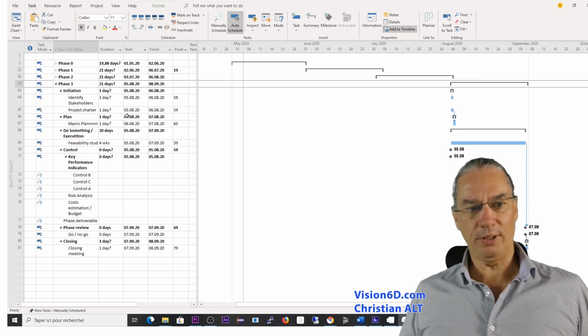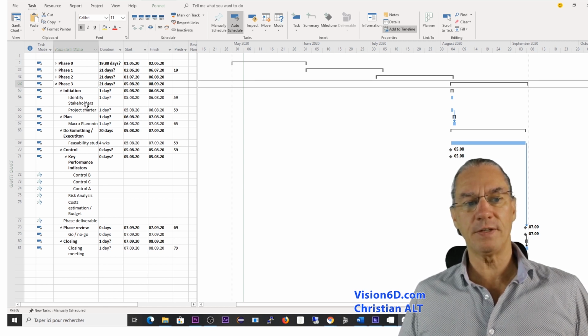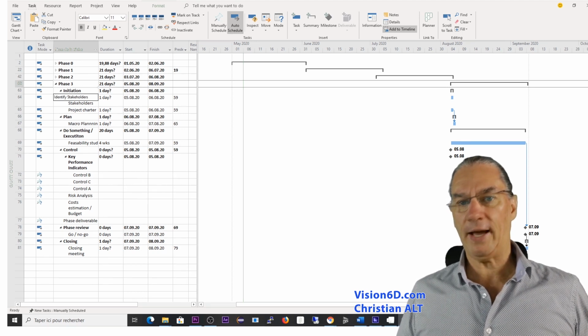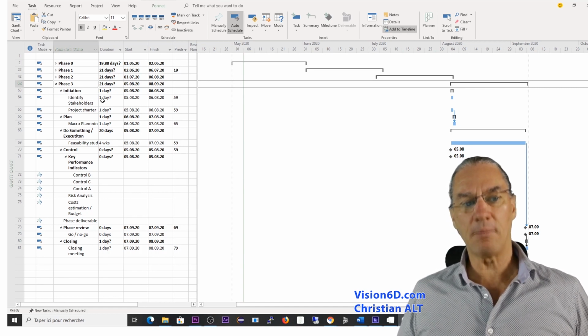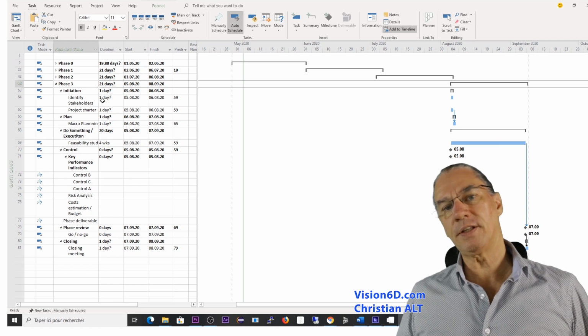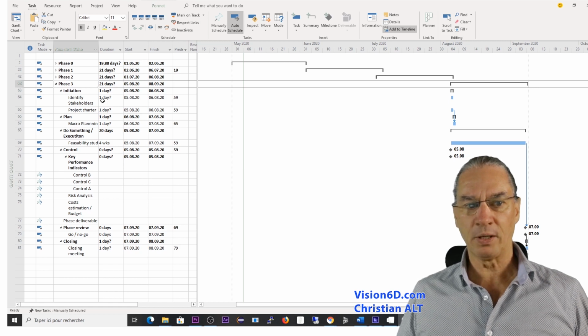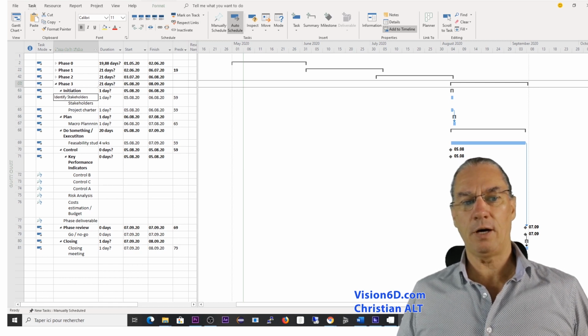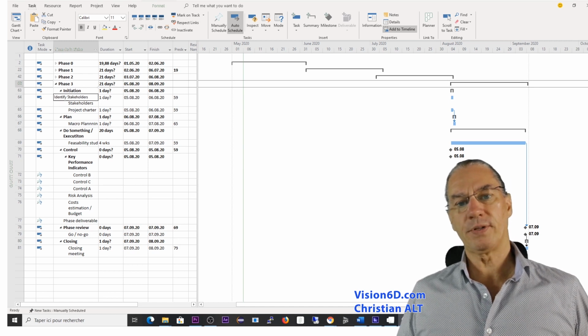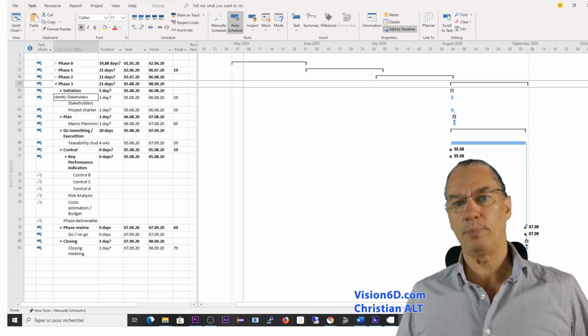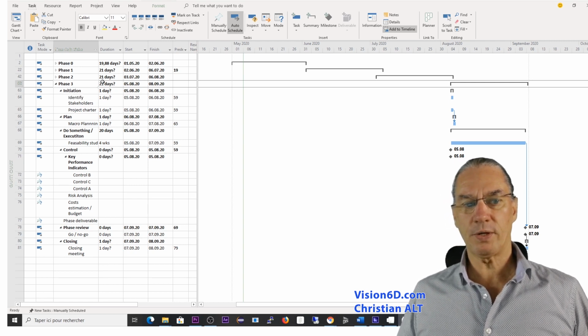Looking at phase 3, there is maybe one point that I didn't discuss. It's why do we have in another phase also identify stakeholder and project charter. The reason why I leave this, it doesn't mean that you have to do it like that in your project. It might be that in certain projects, it's almost like restarting a new project. Imagine, for example, in the example of the beach in Geneva, when you entered the phase of the opposition, the stakeholders started to be the different political parties, the population. This was really important.